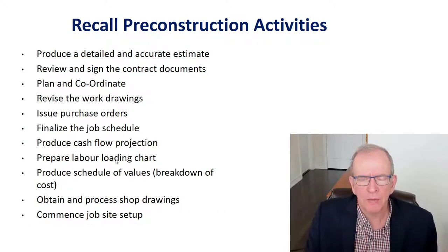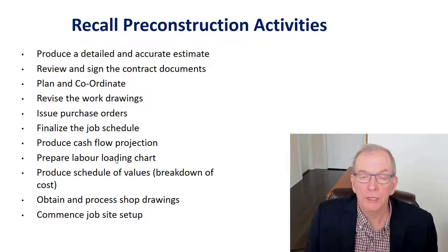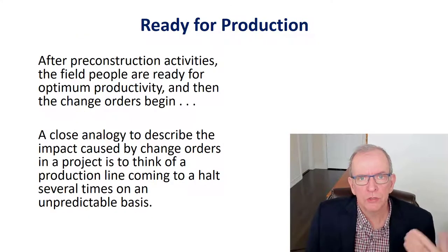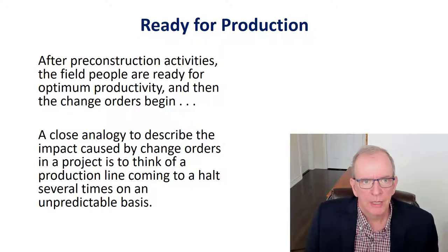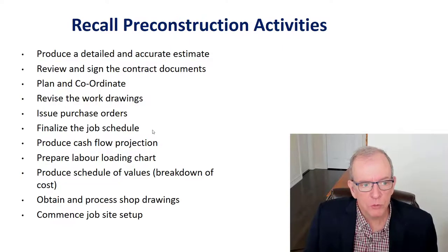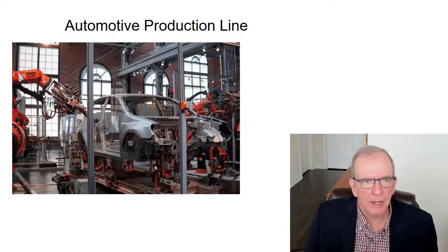So the amount of value that project has, well, if you're deleting that off the project, if you've invested a certain amount of time, and keep in mind, it could be weeks of work, then that has a value to it and there should be a claim made for it. Otherwise, again, you're not only losing that extra work, you're losing the value of the work that you put into it in the early stages of pre-construction. So you work along at this and you make sure that your field people are ready and you've sort of lined things up. So you've done your due diligence in pre-construction, and then that can be problematic later on.